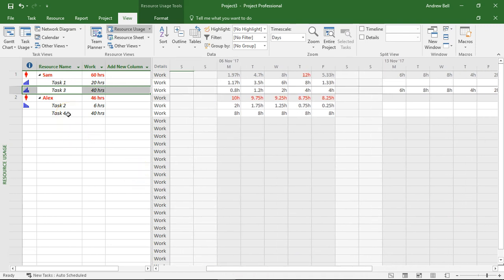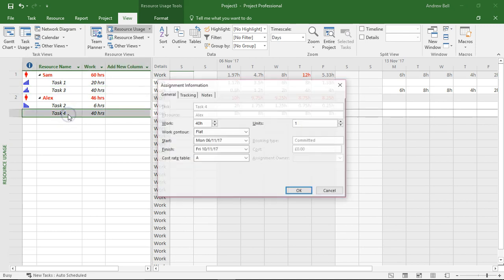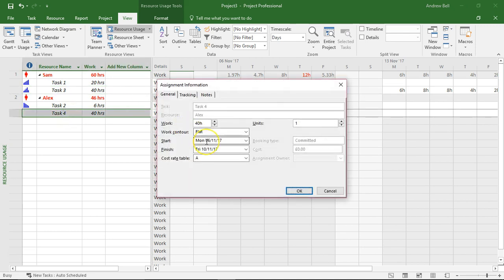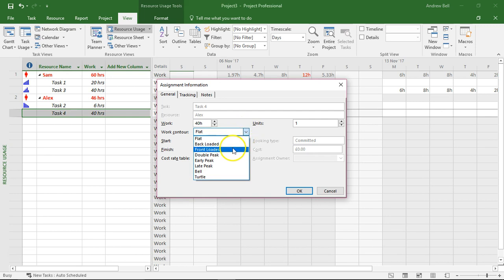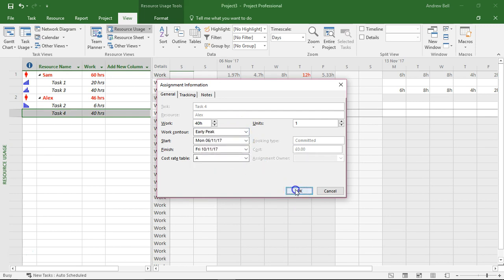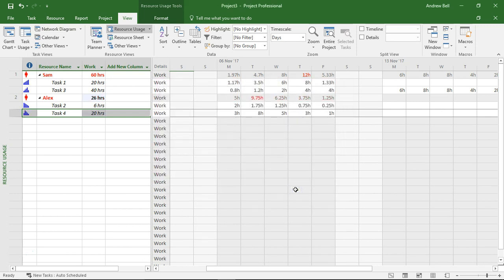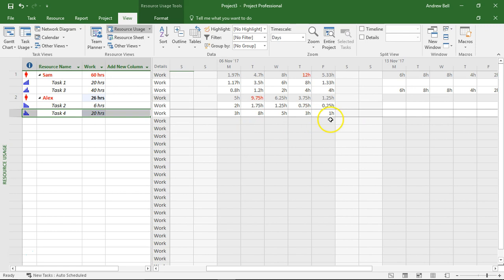Let's have a look at task four, Alex. This was the fixed duration task. I'm going to put an early peak on this one. And the computer has said well actually because this is fixed duration whatever I do must fit into five days. There's the early peak. It's peaking on the Tuesday but it's reduced the hours of work to 20 hours.